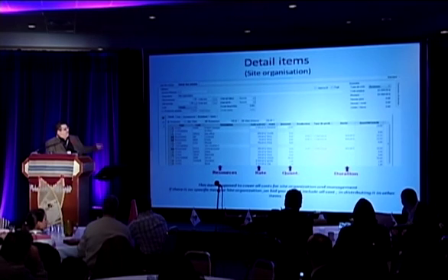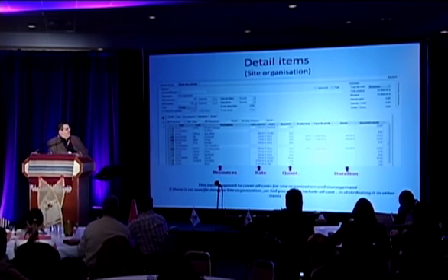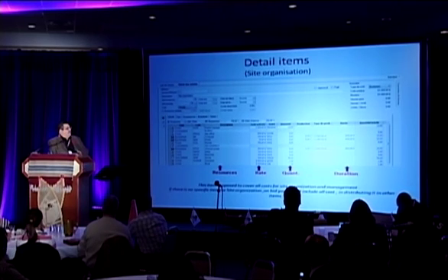So you add all of that in there. Another item that people sometimes fail to calculate properly is your supervision. If you're going to have foremen, superintendents, project manager, safety, security people, make sure you calculate all of those items in your bid from the beginning.